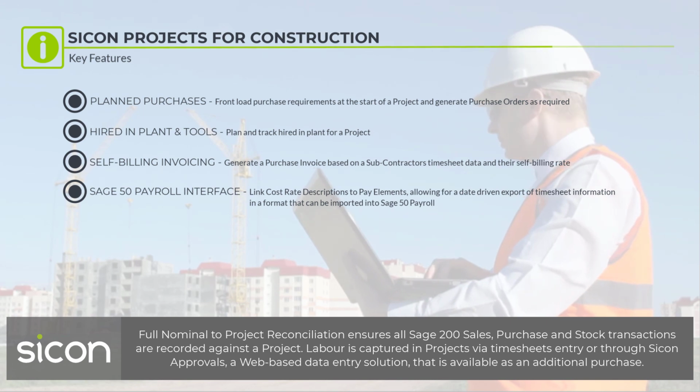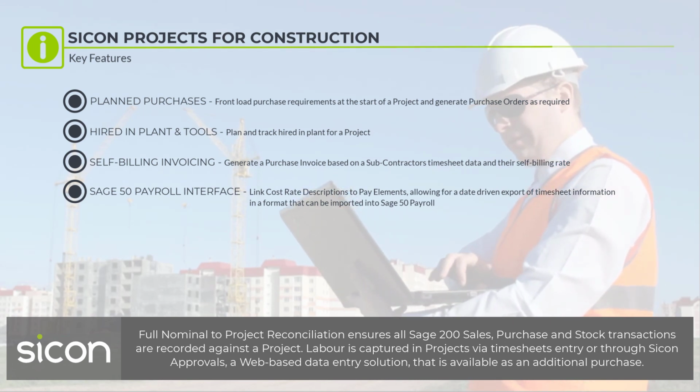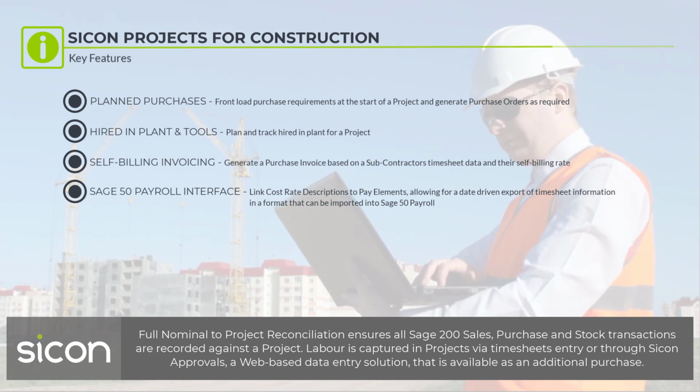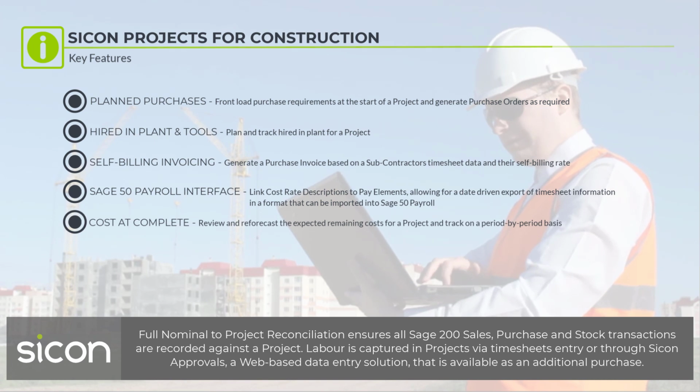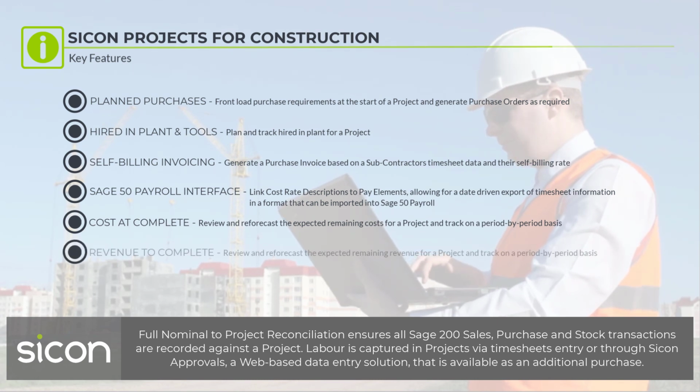Sage 50 payroll interface: link cost rate descriptions to pay elements, allowing for a date-driven export of timesheet information in a format that can be imported into Sage 50 Payroll. Cost at complete: review and reforecast the expected remaining costs for a project and track on a period-by-period basis.